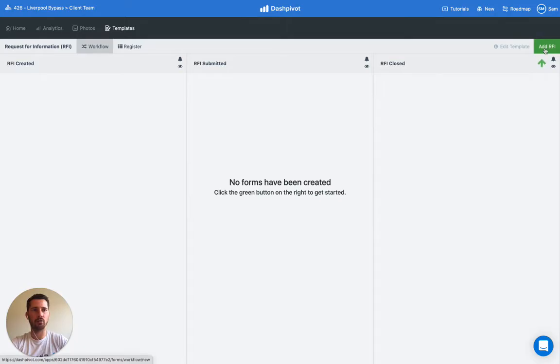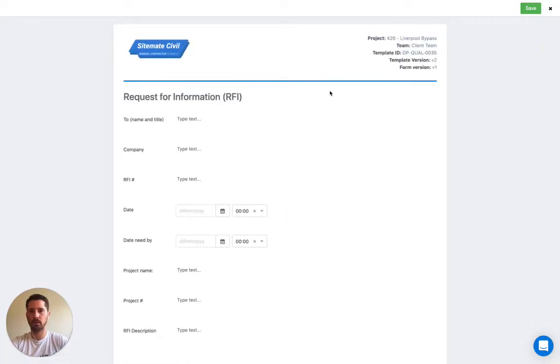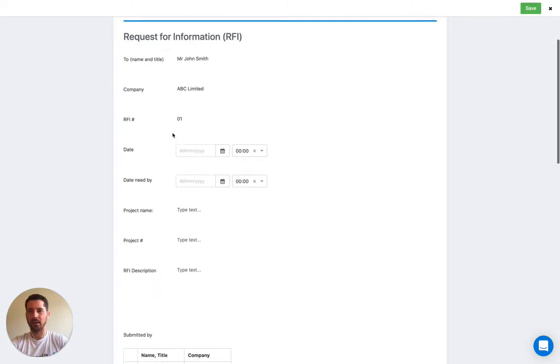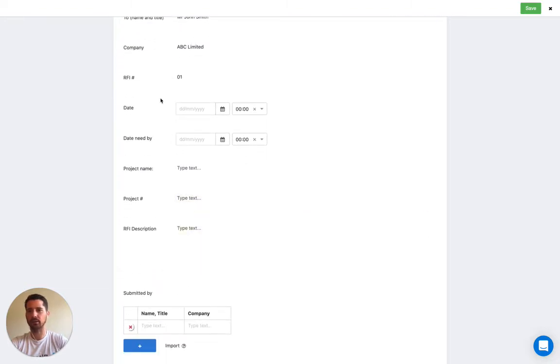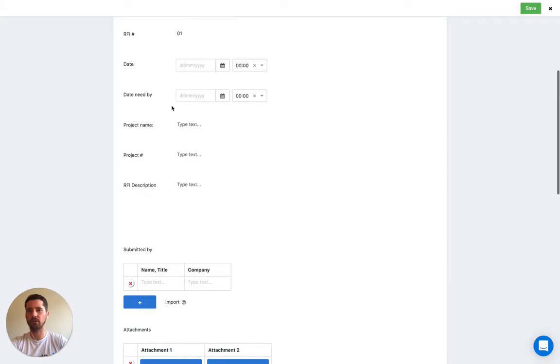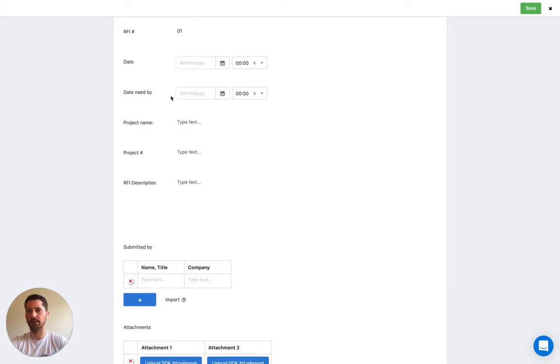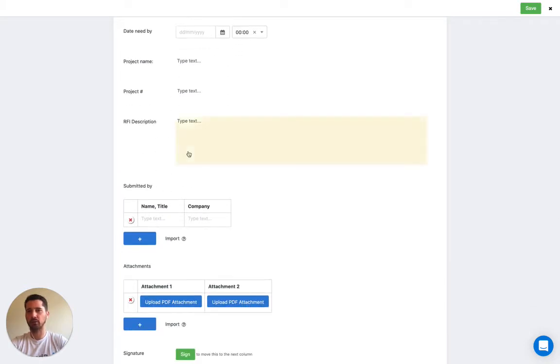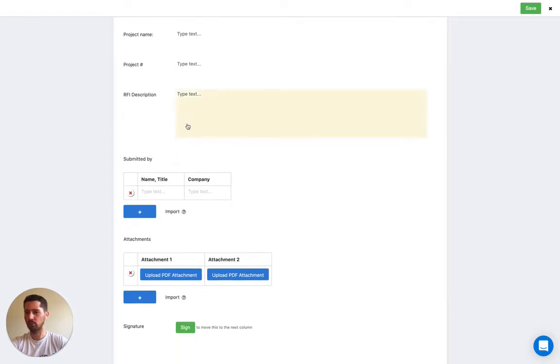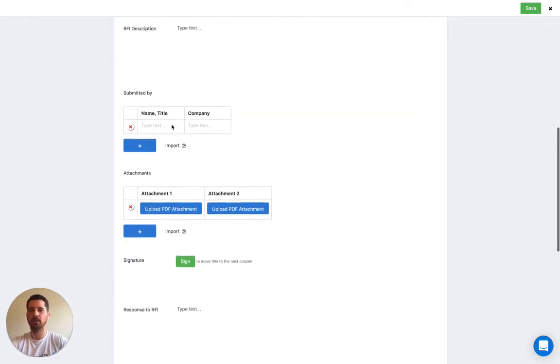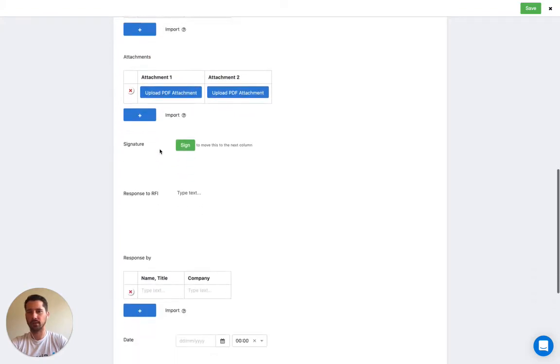Let's create a new RFI. We pull up the form and we need to fill it out. So maybe we're sending this to Mr. John Smith. The company is ABC Limited. Maybe it's our first RFI. And of course, we just need to fill out all the details. We won't cover all of them on this video, but we have the date it's needed by, the project, the RFI description, so we can leave some details there about what exactly it is that's unclear. And then there's sections for uploading drawings and things like that.